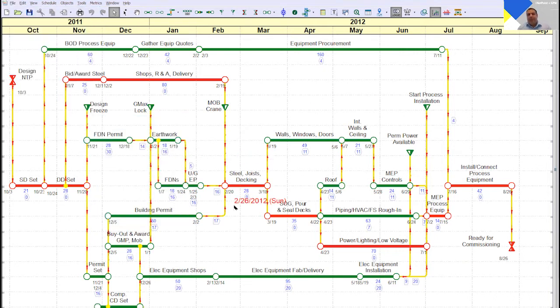One important thing to remember when transferring data between NetPoint and P6 is that NetPoint has certain features that P6 does not support, and it's the other way too: P6 has certain features that NetPoint does not support. One of the biggest features within NetPoint is the idea of planned dates, because of the GPM algorithms that it can support. If you have activities that are on planned dates, when you transfer them over to P6 and schedule them, those activities will fall back earlier to their early start dates. That is just how the CPM algorithm works. So if you wanted to preserve those dates, one option is to constrain the activities within your schedule. Let's say in this case it was equipment procurement, which was on a planned date.